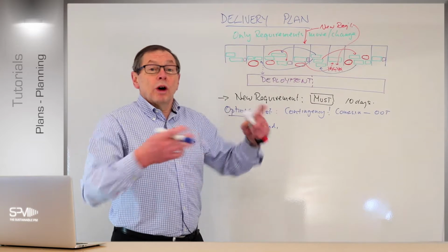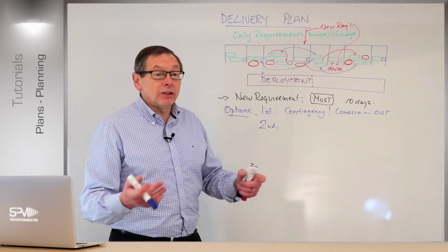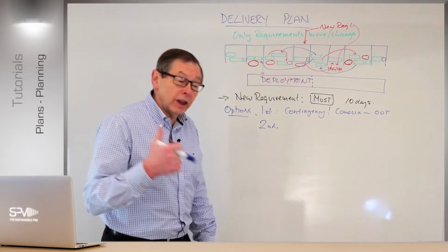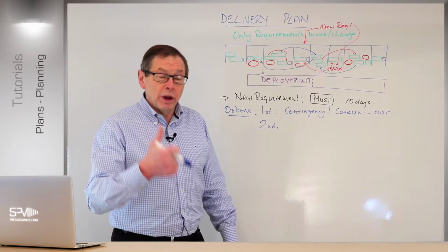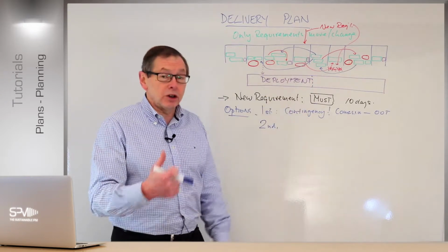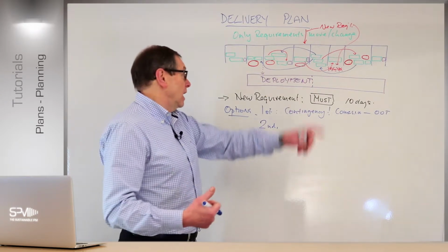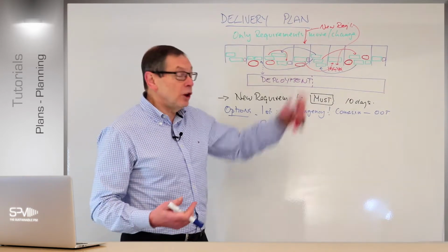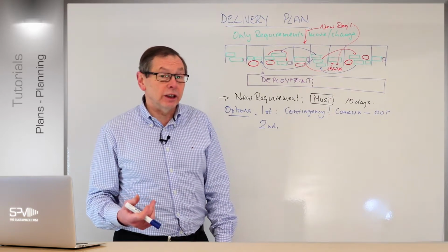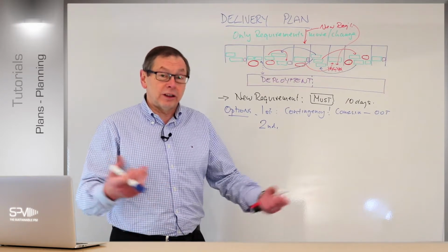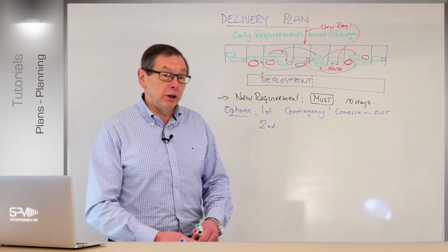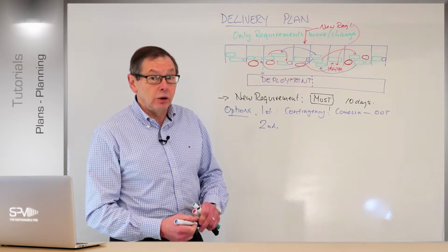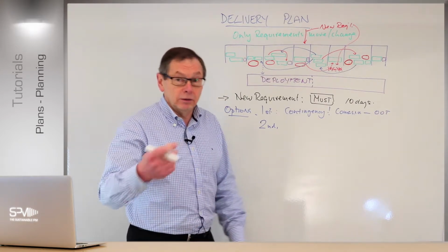Okay, so what has to happen? The main thing is, as long as the business and the one with the right authority signs off and says, that's okay, we can give you more money, we can get some slack from somewhere else, we'll get the budget for you to pay for those 10 days, and we'll still preserve the end of the project. Nothing wrong with that. We're still preserving the end date, which is key factor initially, right? Cost is also a factor because it has an impact on the return on the investment and the overall budget. But remember, budgets are flexible. If the business want to make them flexible, they can do. They just want to control the spend most of the time.